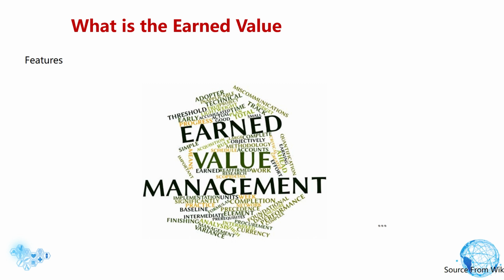A project plan that identifies work to be accomplished. Predefined earning rules, also called metrics, to quantify the accomplishment of work, called earned value, EV, or budgeted cost of work performed, BCWP. The most basic requirement of an EVM system is that it quantifies progress using PV and EV.